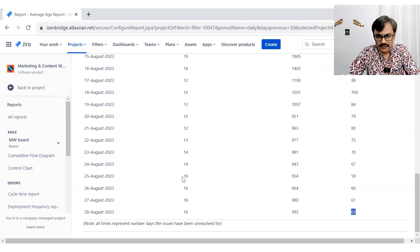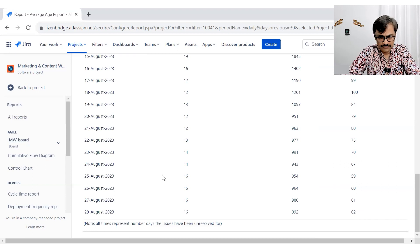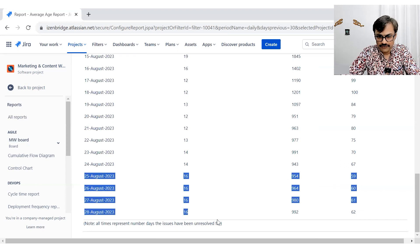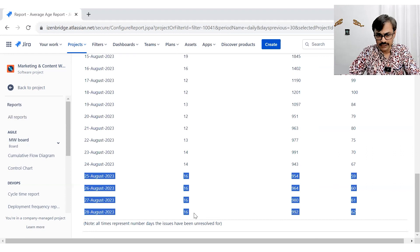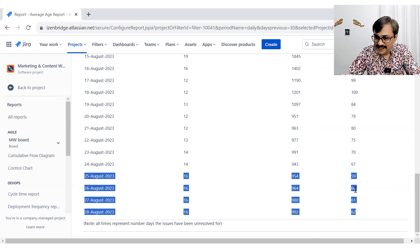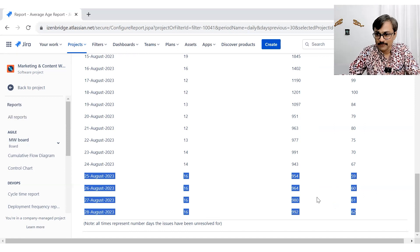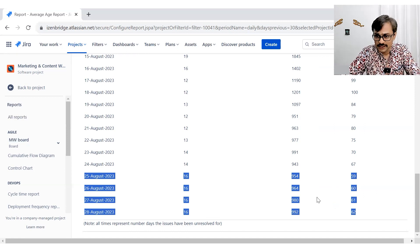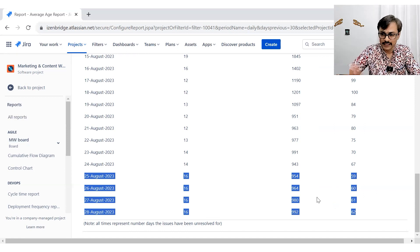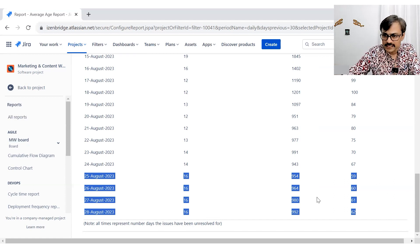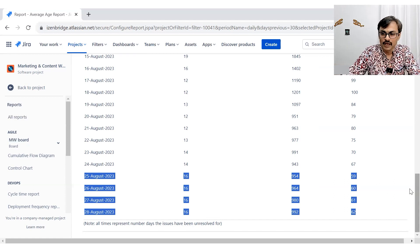You can see that these things are from few days. I am not working on any issues. So looks like from the 25th to now, I always have 16 open issues only from last four days, and my average age is increasing because I'm not doing anything. I'm not resolving these issues and that's why day by day, the average age is increasing.